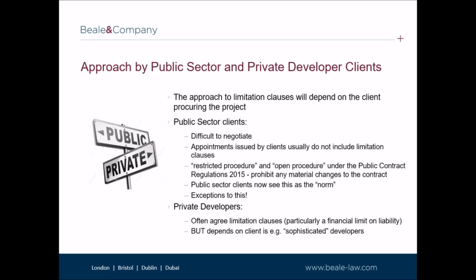Turning firstly to the public sector, in our view, it can often be difficult for a consultant to negotiate a limitation and exclusion clause in appointments issued by clients which usually do not include limitation and exclusion clauses. In our view, this is generally because public sector clients now see this as the norm, and also because most public sector appointments are procured pursuant to the restricted procedure and open procedure under the Public Contracts Regulations 2015.